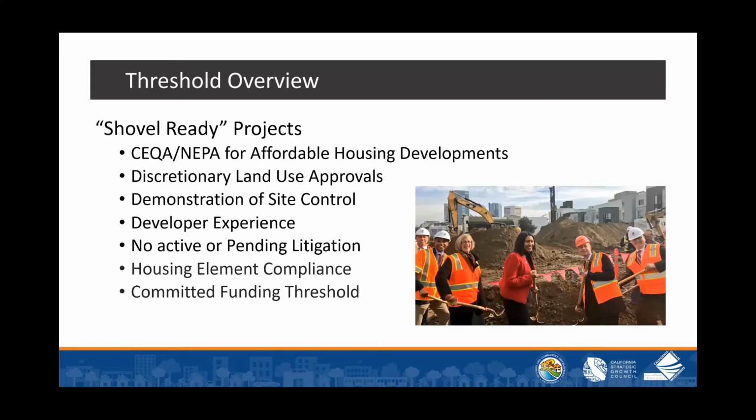Your project must also be shovel ready, and what shovel ready means is that you have your CEQA and NEPA already ready for affordable housing development. You have discretionary land use approvals. You must demonstrate site control. You must have developer experience and no active or pending litigations. And you must comply with the housing element and have committed funding thresholds met.